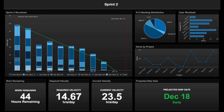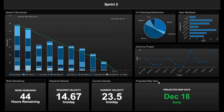This is an example of a burndown chart and other gadgets from the internet. As you can see, as time goes on and workload decreases, the chart tends toward zero and gives a projected ship date. In this example, the due date was December 19th, the projected ship date was December 18th — so it's early. Work remaining is 44 hours, current velocity is 23.5 hours per day, and required velocity is 14.67 hours per day, meaning developers can take it easy. We also have a backlog distribution pie chart, a user workload chart, and items by project. This concludes my tutorial — thank you for watching and I hope it is helpful.